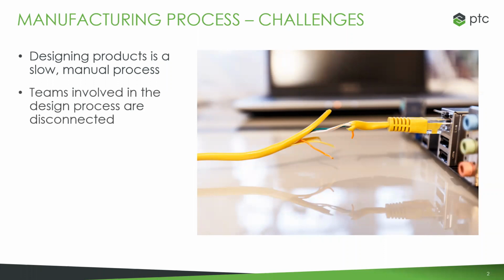A lot of times there was also, like I said before, a disconnect between engineering and manufacturing. So manufacturing really had no insight into the product, and they end up spending a lot of time just figuring out the resources they need, right? Gathering information, learning the assembly. There was times that I saw that manufacturing had no idea a change was even happening. So then they'd already maybe have assembled 20 units, and then they'd have to go back and redo all of them. And then kind of with that, you can imagine the cost of the rework, the downtime. It's stuff that we preach constantly.